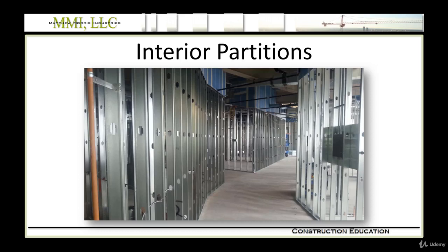And we can also start installing MEP systems, mechanical, electrical, plumbing, fire suppression. So for the course, we had to choose some sort of progression, and we started with enclosure. Now we're going to the architectural portions of the job. That would be interior partitions, finishes, specialties, furnishings, things like that. And we'll end the course with MEP systems. Knowing though that they're all dependent upon each other and they all happen almost at the same time in the project.